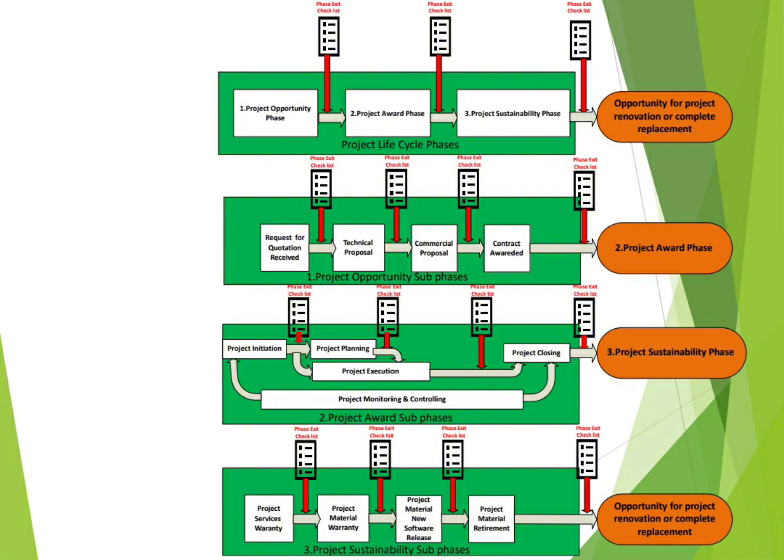Working very hard at the site, performing the necessary activities at site, and ensuring to have all the SAT reports, site acceptance test reports signed, timesheets signed, so as to secure that the project execution is done perfectly as per the requirements of the project, as per the requirements of your customer. So here it is all the physical activities to make the project successful done during project execution.